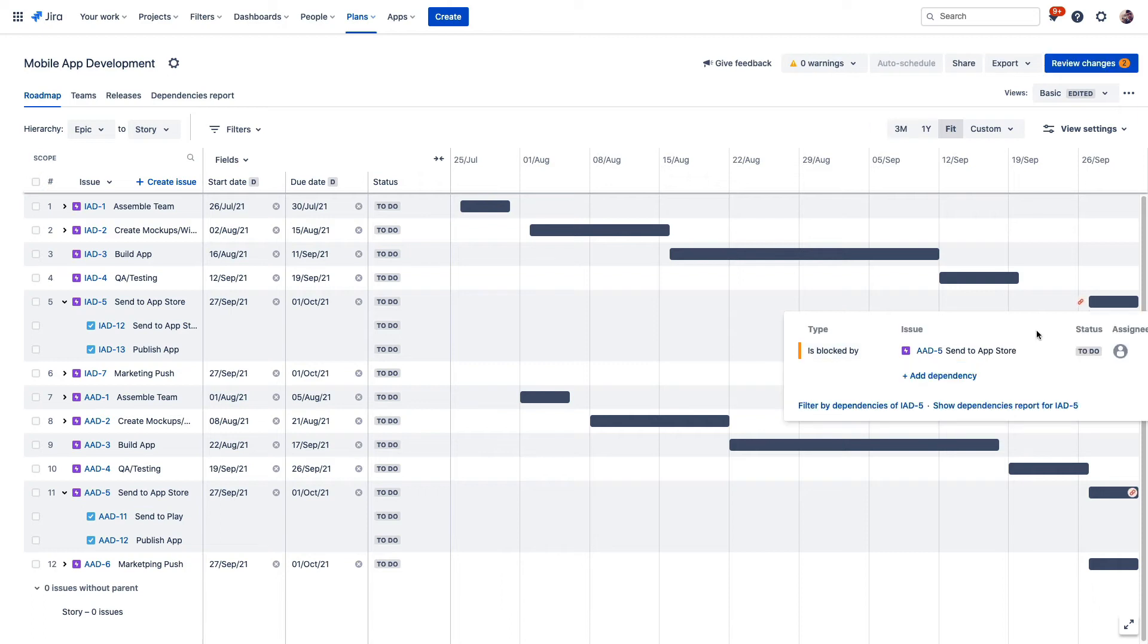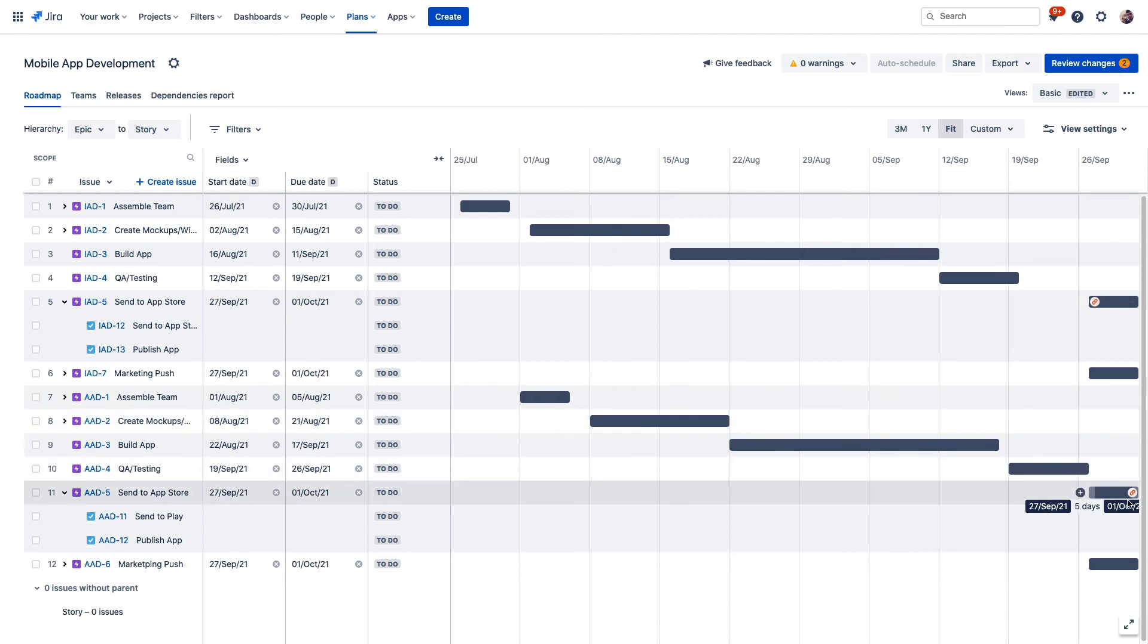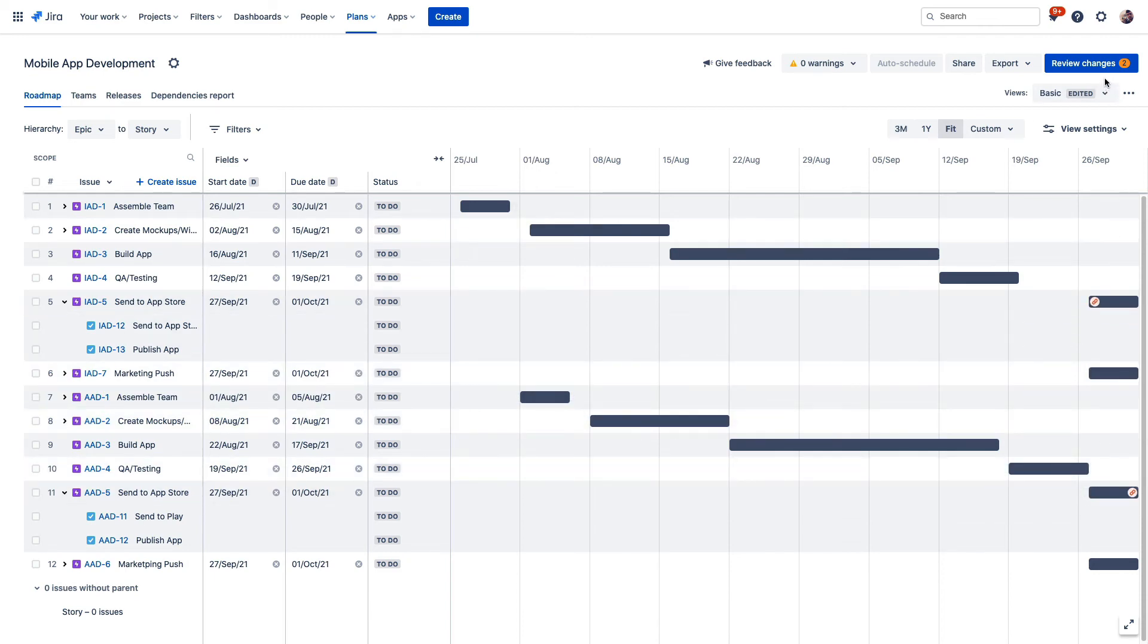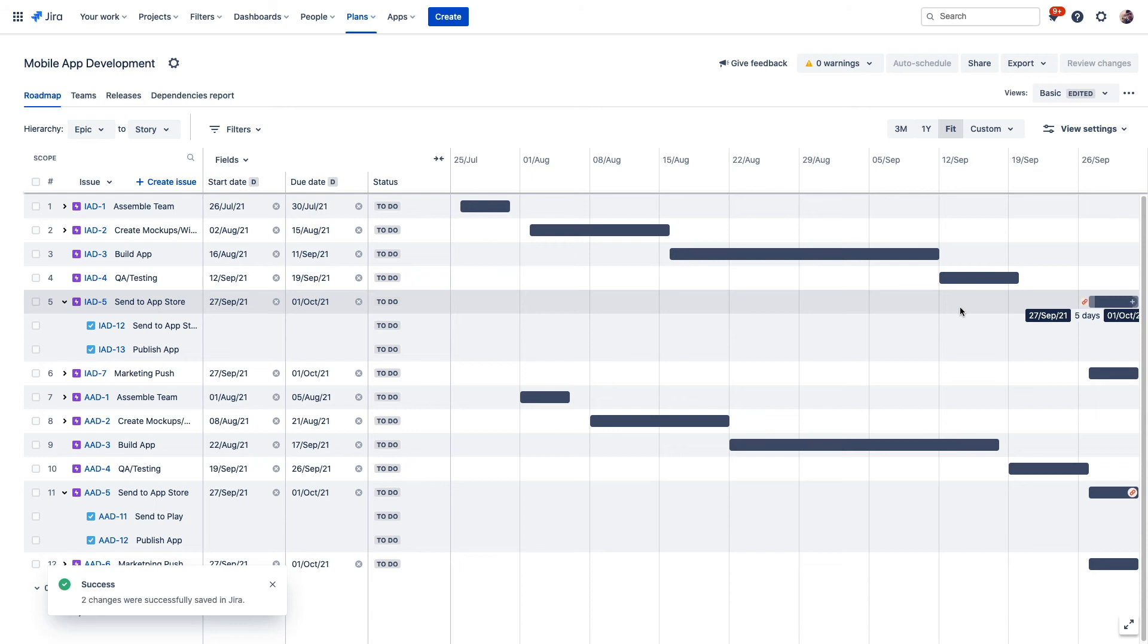That way, if work on one app completes before the other one, everyone will know to wait until work on both is completed before submitting them to Google Play and the App Store, respectively. After configuring your cross-project dependencies exactly how you like them, you can publish the changes just like we saw before, so they'll reflect in the project data for those teams.